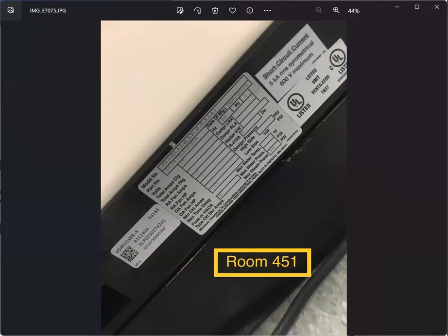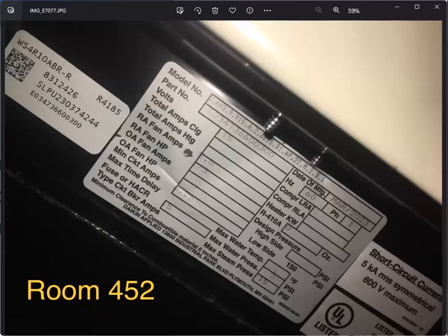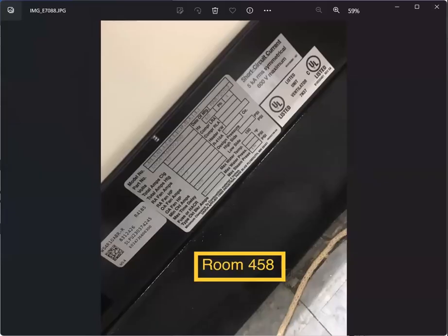And this is the better way to identify the name tag. So probably you could do this also if you're going to do an inspection. If the units are so many in a particular building, you need to take photos afterwards. You need to label where you took it, which part of the building it is. In this case, I have put the room number so that when I evaluate the drawing, it represents the right amount, the right capacity, or the right equipment to be installed.